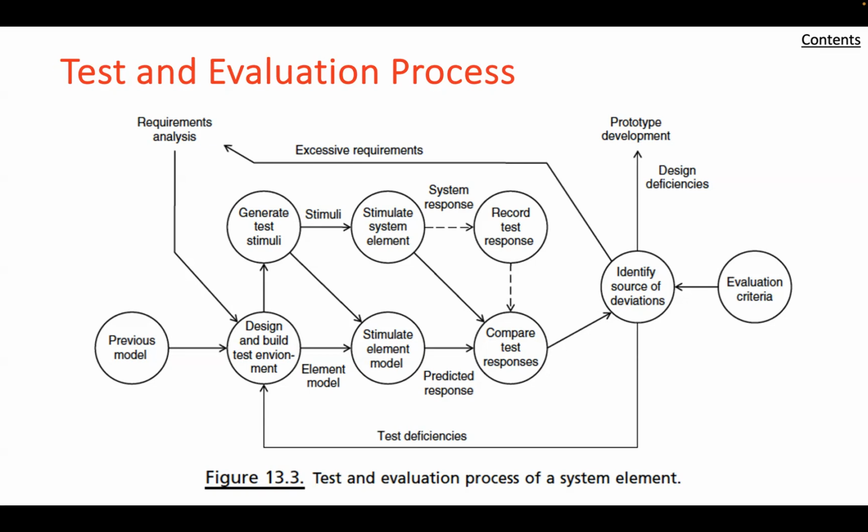Well, what about testing of design modification? The test programs must anticipate that unexpected results may occur and reveal design deficiencies. Accordingly, they must provide schedule, time, and resources to validate changes that correct such deficiencies. And so is it the hardware? Is it something to do with the test equipment? All of those things need to be explored and then finally adjudicated.